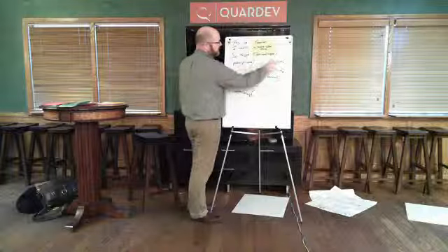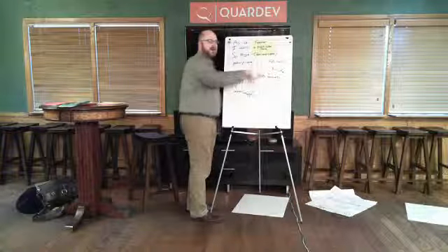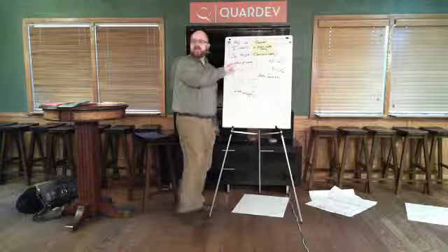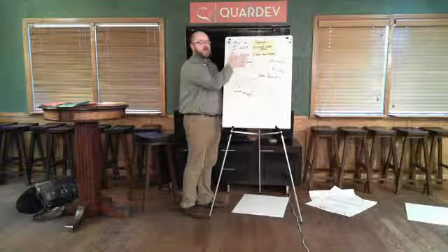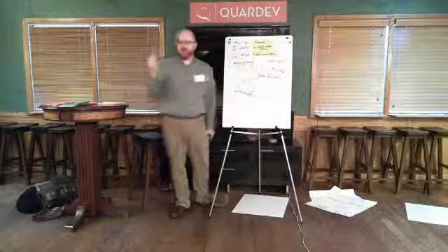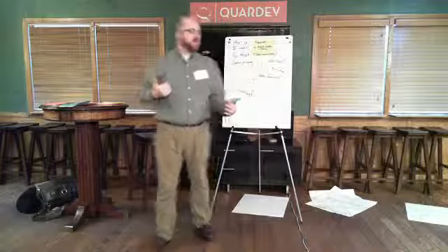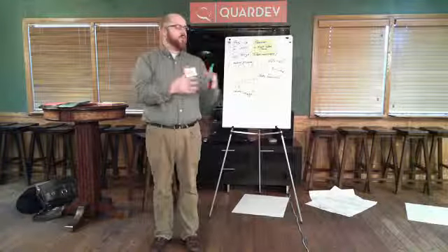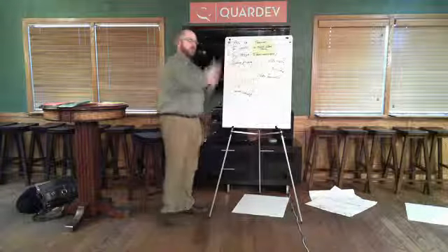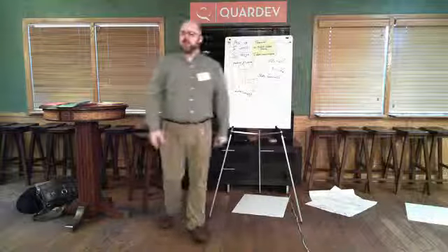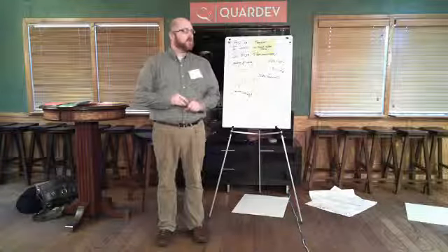It's difficult to write this story without some kind of file size included in that story. So a file size restriction may not materially change the size of the story. Okay, I'll throw an if statement in there, and we ought to test that. That still is one piece, one user story. There's a place where it gets too big, and you have to break it up, and that's a whole other part of the Agile art. It's a good question.